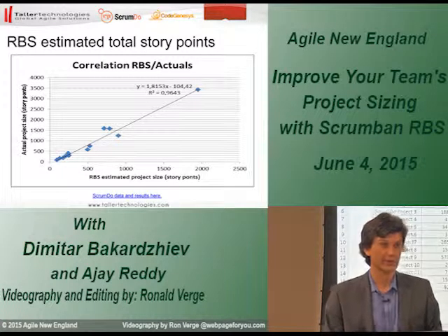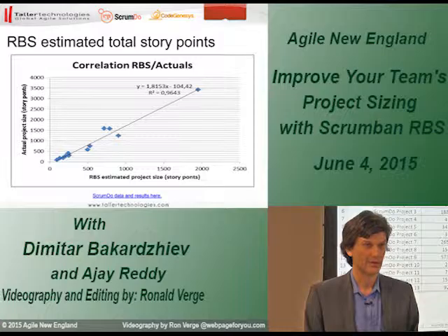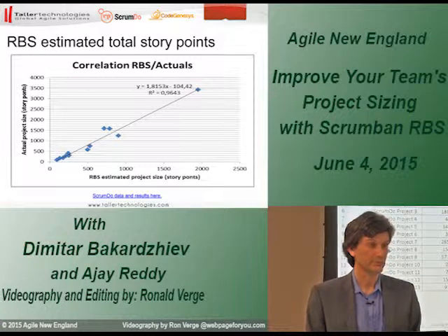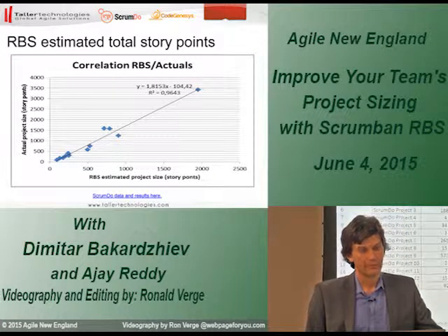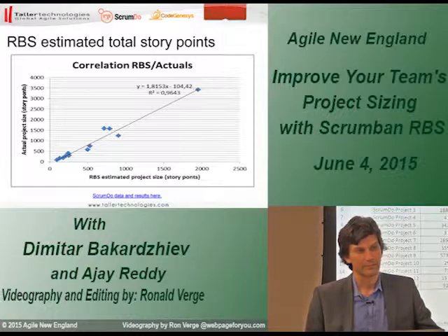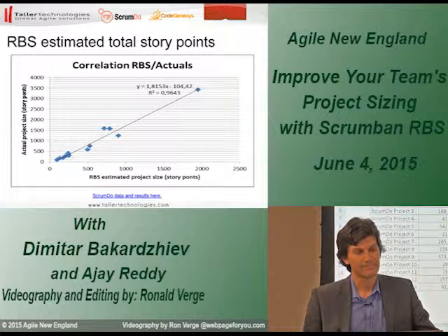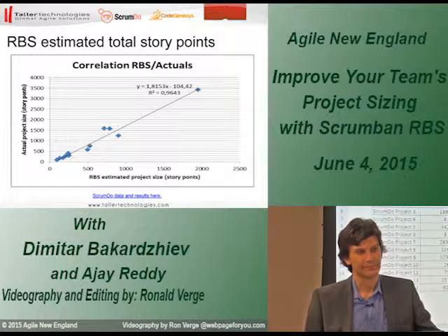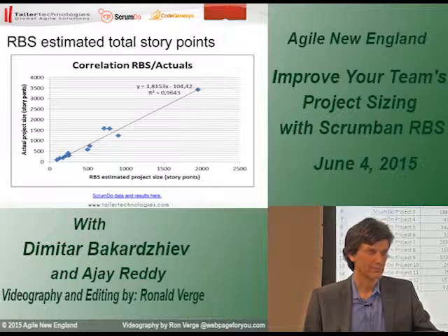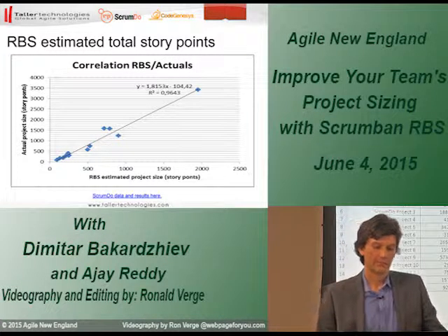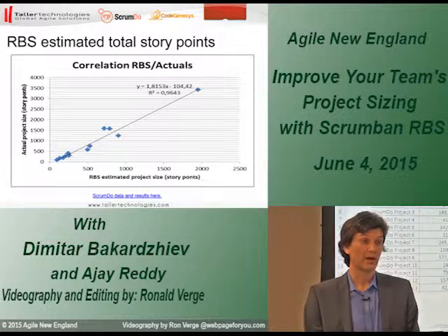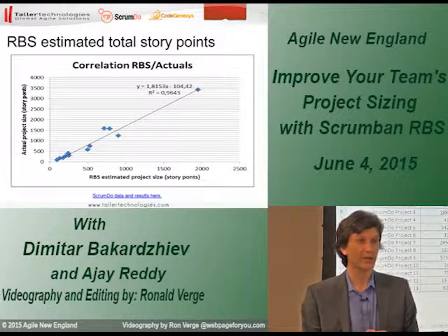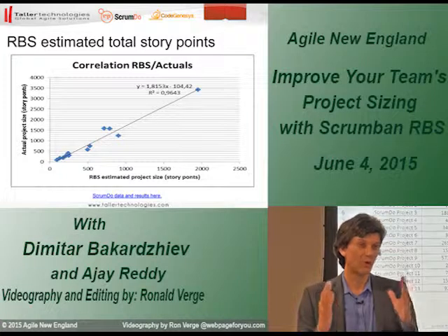But it's always with the math. You could use historical data too, right? If you knew it was one story point, you could look at historical things. If the estimate was 2 story points, rather than avoid the bias that this gentleman talked about, you could go back and look at other things that had 2 story points, look at the actuals from previous things that had 2 story point estimates, and simply plug the average of those numbers in for Monte Carlo. But again, it's a statistic. The idea behind sampling is that by sampling we can learn about the universe with very few samples. That's the general idea.